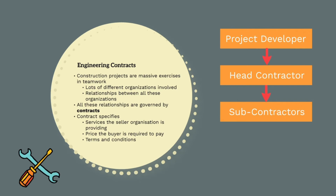Therefore, head contractors — also known as general contractors — always need to engage external parties to perform works for them. In the same way, the project developer will engage a head contractor to complete the project for them. All these relationships are governed by contracts. There are contracts in place between the project developer and head contractor, and between the head contractor and all their subcontractors and suppliers. These contracts specify the services the seller organisation is providing, the price the buyer organisation is required to pay, and the terms and conditions of this relationship.